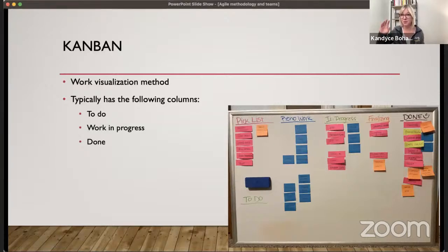And then there was stuff that was more out of my control. So the renovation work. When are the guys going to come over to tear down the garage and rebuild it up? Each of those blue Post-its was something a little bit more out of my control, but I could still see the progress happen. Then you see the in progress column there. From a Kanban perspective, there's probably too much in progress there. If you limit your work in progress, you can focus more and get more done, generally speaking. But sometimes you get a little bit stuck and have to work on multiple things.